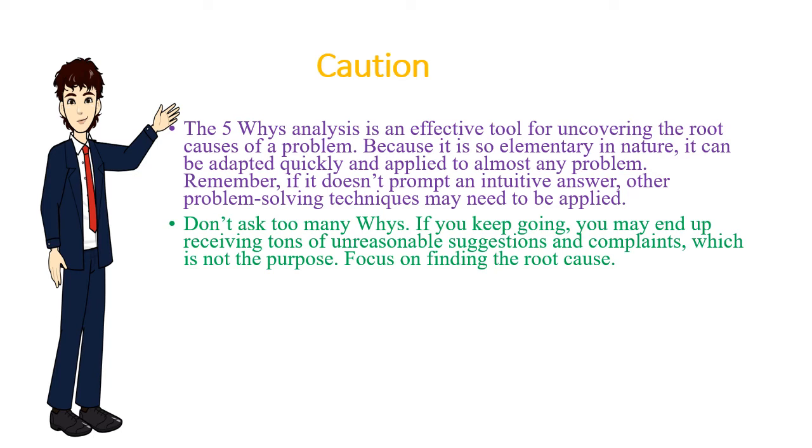You should know how much work there is, what the volume of the work is, and how much time it really requires to complete. From this you can have an idea whether the root cause that you have identified through the 5 why analysis is real or not. This validation technique you can always use.